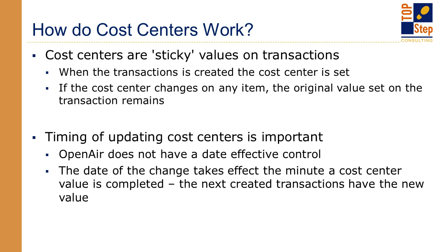Now, something to remember is that cost centers are sticky values. And what we mean by that is that when entering time and expenses, those transactions get stamped with a cost center. And if there's a need to change that cost center after the fact, the transactions are still stamped with that original value. So the only way to change those would be to do a database update or reverse an entry.